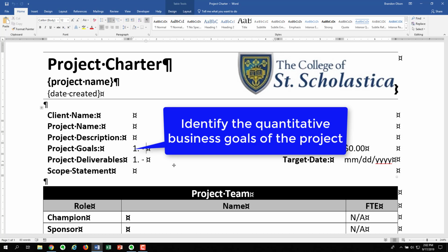And when we define a business goal, we're also going to try to quantify that business goal: reduce retention by 25%, increase revenue by 37%, reduce expenses by 58%, and so forth. That way we have some type of quantitative measure to determine if the project was successful. And that also helps make a business case for the project itself to show its importance to the organization.